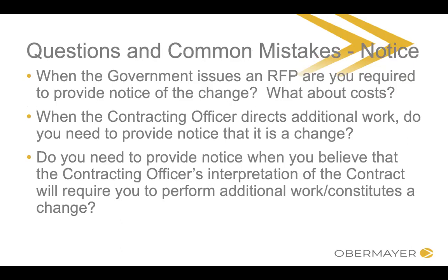So if the government issues an RFP, are you required to say, hey, this is a change to the contract? Do you need to give notice there? No, you don't. Because again, it's only at the RFP stage. They haven't issued a mod yet. If after you submit your response to the RFP, the government says, yep, looks good, we're going to issue a mod, we're going to do an express change to the contract, even then you wouldn't have to give notice that you consider it a change, because that type of notice is only required when it's a constructive change. Remember, this would be an express change. Now, the reason for that is obviously the government is calling it a mod.